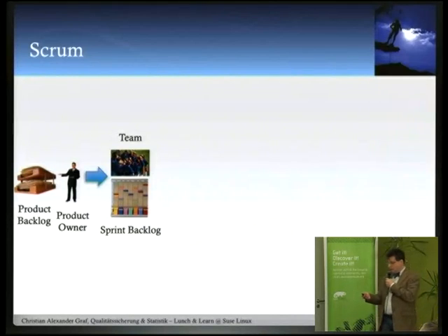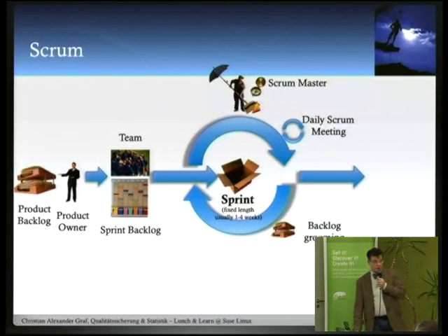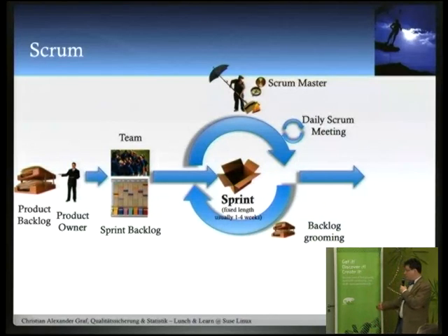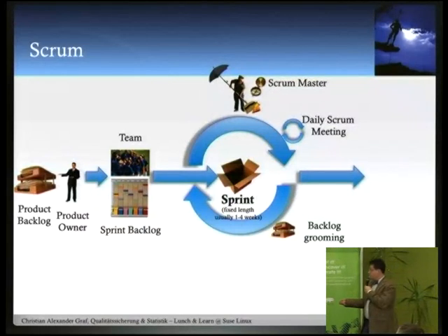Okay, and that's what they decide to implement first. They put it into a so-called sprint. That is usually a time-boxed period of time, typically between 1 to 4 weeks, might be longer. Sometimes embedded branches usually have 6 weeks because you have to deal often with new hardware and so on. Okay, so this is actually adaptable like you want.